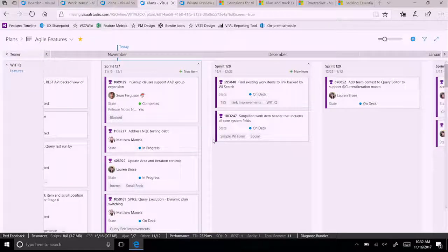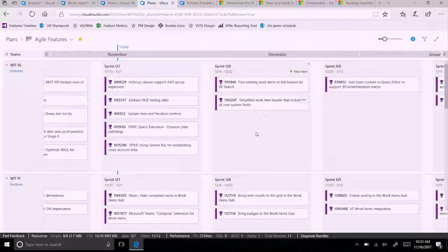The way we run it is we have a sprintly meeting where the leads for all 4 teams come together, and we just take a look at, hey, what's in progress right now? What are we looking at 3 sprints out? And to do that, one great way is to just hit T, and you can make it title only so that you get a more succinct view. And this just allows a visual for us to have a really great conversation about, hey, are there any dependencies? And you'll hear Aaron talk about this a lot where he says the aha moments. We have a lot of aha moments in these meetings where I say, hey, see that you're working on this next sprint. We've got a dependency on this, and what can we do about that? So it's a really great way for us to use the tool that we built.